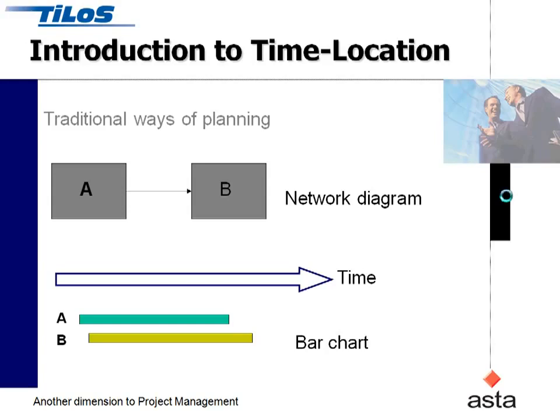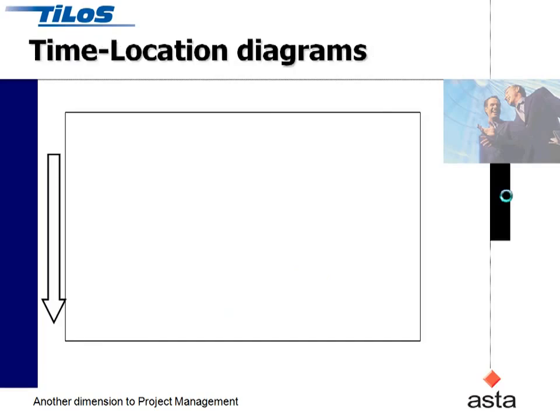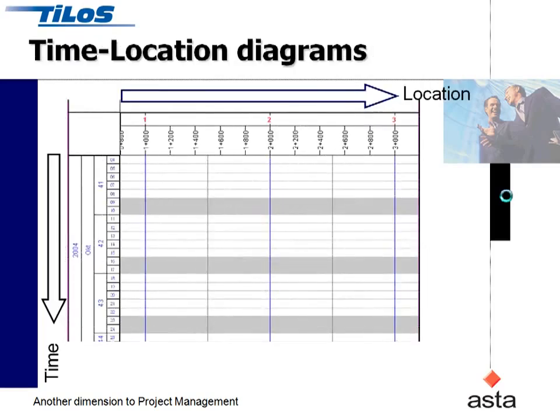You can see here that activity B starts and finishes after activity A. But if we're looking at this as a linear project, we need to plot that on a grid where we've got distance in one dimension and time in the other.